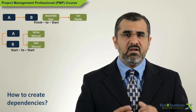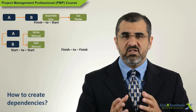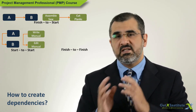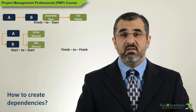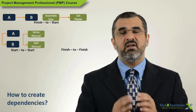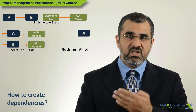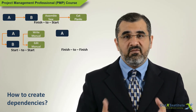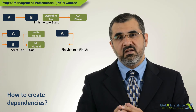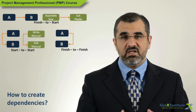The third type is the finish-to-finish relationship. Finish the predecessor activity, then finish the successor activity. The successor activity cannot be logically completed until the predecessor is complete. So finish A, then finish B. If the finish of A is late, B will continue but cannot be logically completed.